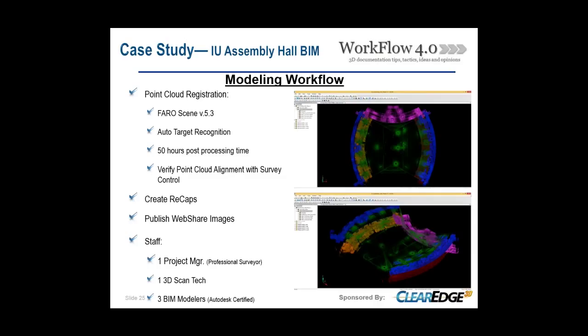Once our staff surveyor verified and checked off on the registration, we began the process of creating the ReCaps, which we would use later on during the modeling process. And then we also publish WebShare images. We host them here on a dedicated server. Our modeling staff would use that to assist in the modeling, and we also made that available to project stakeholders and the design firms as well. So in all, a staff of 5 worked on the post-processing in this job.